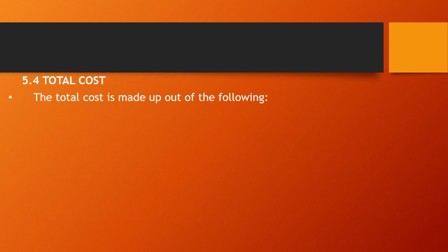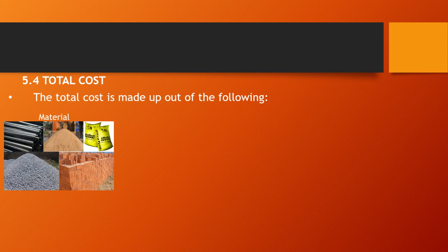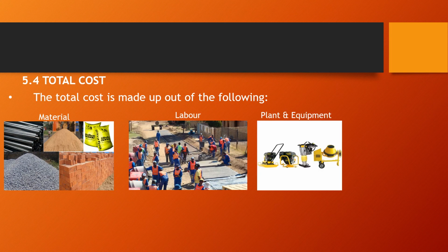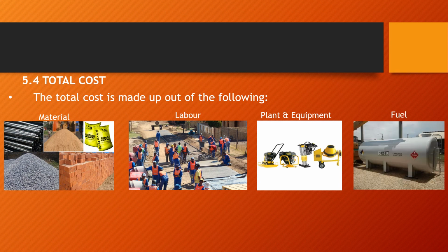Okay, let's look at the total cost. It's made up of the following. Any rate is made up of material, the labor, the plant and equipment, and the fuel.